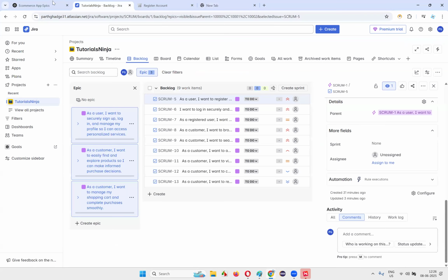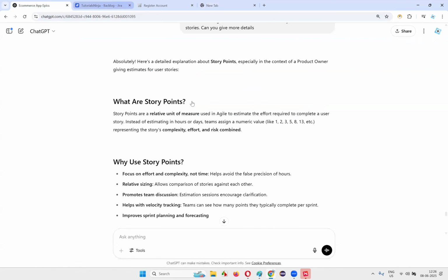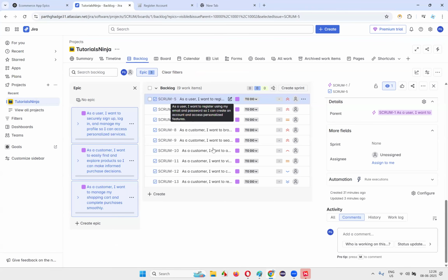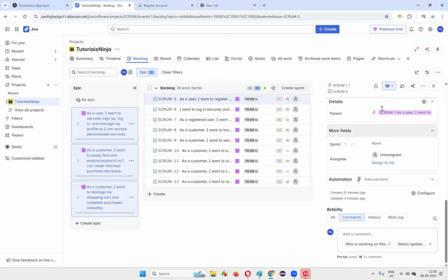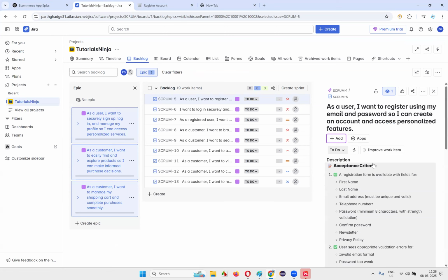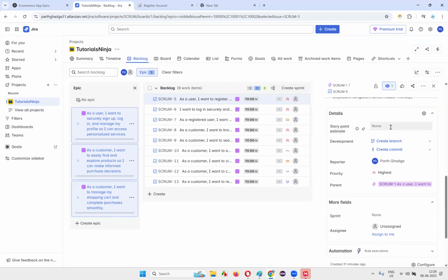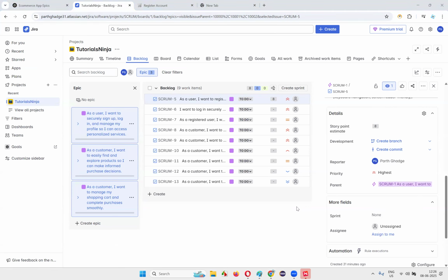So here in this Fibonacci series, we need to select something. When compared with other stories, the product owner will select something. For example, here in this Fibonacci series, 5 is there, right? Or 8 is there. Okay, let's give 8 here. Let's say the product owner, based on the size of the story and all, is giving Fibonacci number 8 as story points. Fine, clear? Is everyone clear on how the product owner gives the estimates in the form of user story points in the Fibonacci series?